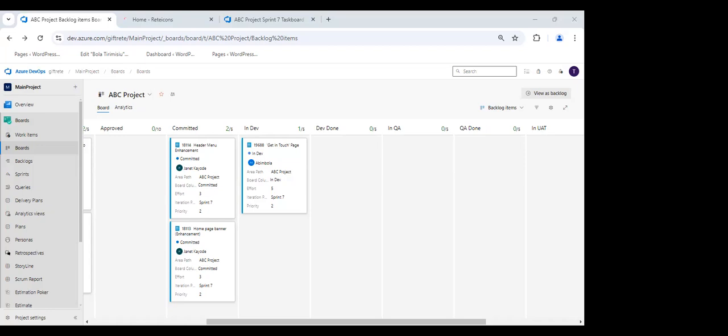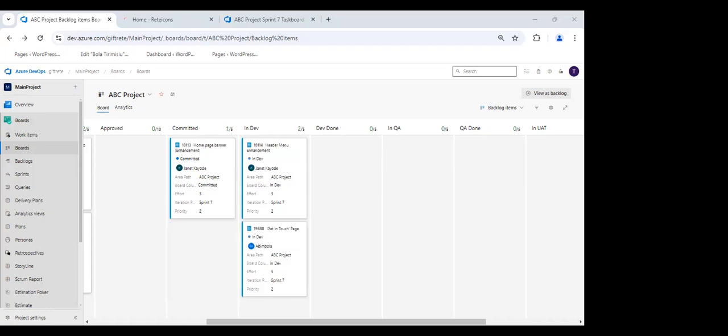So thank you. And last thing, if you also notice, when she was doing the capacity, she did not call the BA, she did not call the PO, because they are not working on that particular task. The people working on that task are the devs and the testers. So they are the ones we need to know their capacity for the 2-week sprint, right? Really, in the ideal setting too, you should have an idea of whether your BA is not going to be around, who is going to fit in, or whether she has prepared stories for the next couple of sprints ahead. You need to know that a bit, but officially on that board, you just need to know that of the dev and the tester. So I guess that's about it, from what they showcased for us.